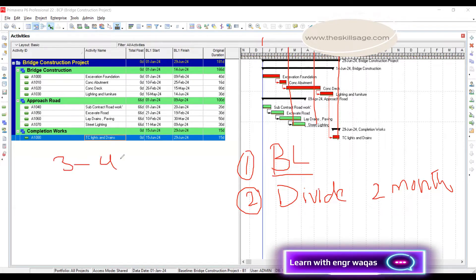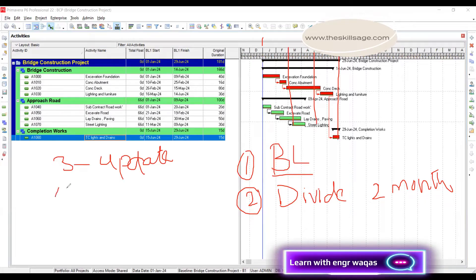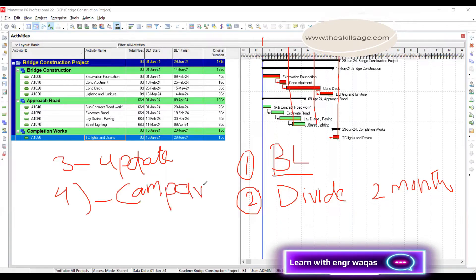The third important step is to update our project progress. For that we need to carry contemporaneous site records — that's why windows analysis is very comprehensive and requires a lot of effort and accurate data from site, covering progress, accurate dates, and events like delays or rainy season. The fourth step is comparison of schedules, which P6 will give us automatically. The fifth and final step is to prepare a report on the impact on schedules.